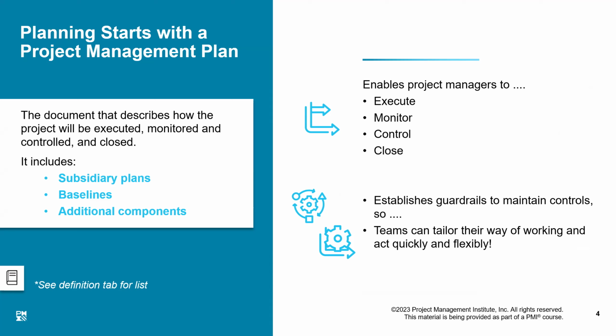In the process of planning, while we are trying to establish our baselines and plan other things, we may come up with a lot of documentation, a lot of artifacts would be created, and those things which we create during this process, which may lead to the baseline, all those documentations are not considered part of the project management plan, and that is archived in a separate place, and that is called project documents. So basically what we are talking about, that in a predictive project, we have got two boxes.